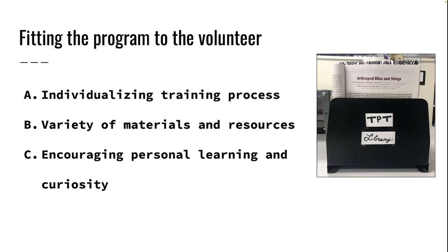When we initially drafted this up, we had intended it for staff. So it was a little bit lengthy, had a lot of details to incorporate all the small things that we may encounter. And when we provided these to the volunteers, we found that it was somewhat off-putting, being kind of dense in terms of the material. And because of that, it was neglected, and there were inconsistencies in the organizational work of the volunteers. We instead drafted up a second version that was one page long, very simple, to the point of what they needed to know. And since then, we believe that we've gotten everyone on the same page in terms of our methodology.